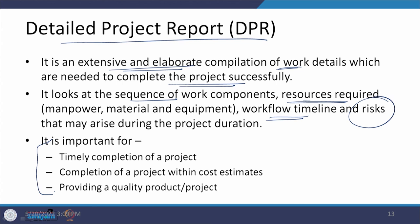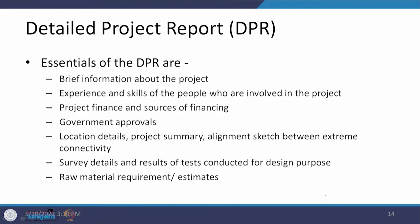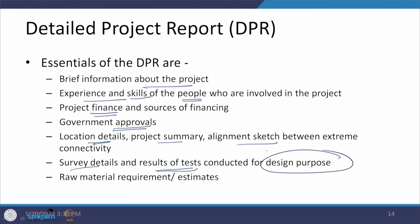This document helps you complete the work on time, within cost estimates, and with good quality. The essentials include information about the project, the experience and skills of the people involved, project financing and its sources, approvals required from government, location details, a summary, a sketch of the alignment, various hydrological, soil, and geological survey results, test results, design direction, raw materials required, their estimates, and their specifications with respect to MORTH guidelines and Indian Roads Congress guidelines.